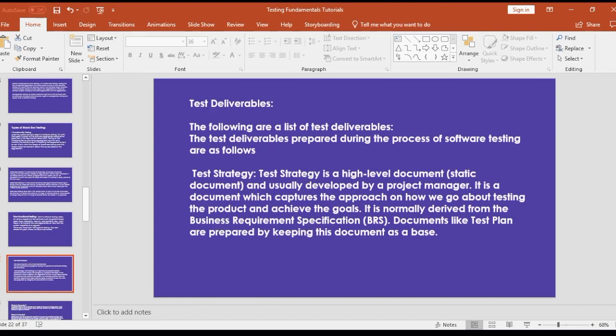You have to estimate how long it will take to test. Your manager would see you at work and say, they've given you your requirements, how long do you think it will take you to test that? And you as a test analyst have to be able to estimate whether it will take 1 day, 2 days, 3 days, or 1 week. Now, within your test plan, you have your estimate. They've given you a 2-week test period. So whether you're doing system integration testing, or your retest and regression testing, everything has to fit within that 2-week window. So you as a test analyst have to know how long it will take you to test.